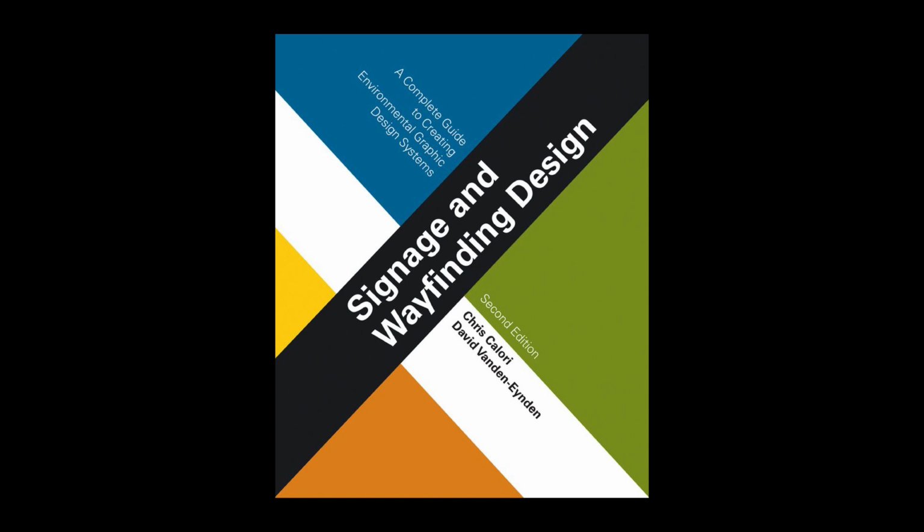It's rare for all the various submittals on a signage program, particularly shop drawings and graphic artwork, to be accepted outright or conditionally on the first round. It's often a process of revise and resubmit based on the design review comments, or less commonly outright rejection when a submittal is so off base that it doesn't even warrant the EG designer's time and consideration.